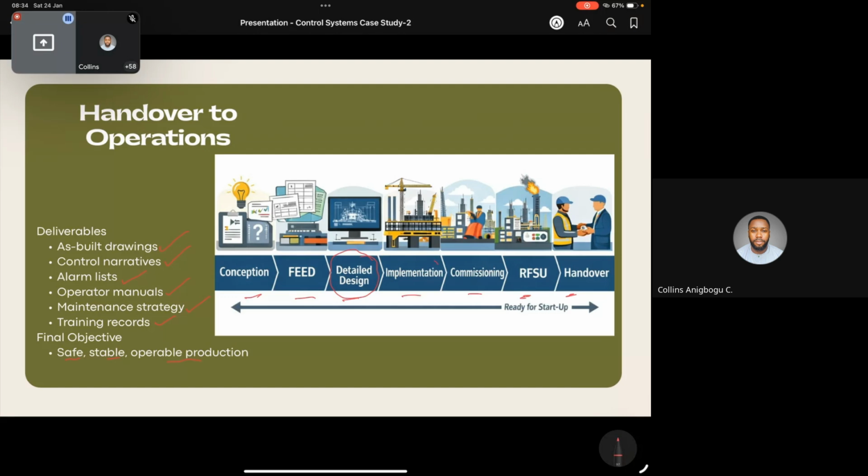And then we have field engineers. They go to the field, and then spanners and bolts, screwdrivers, multimeters, and that is their job. There's another set of guys that are just commissioning engineers. That is their specialty. Just give me the drawing, and when you have finished your construction, then I come in and start the commissioning, right? So they do commissioning up to RFSU, right?